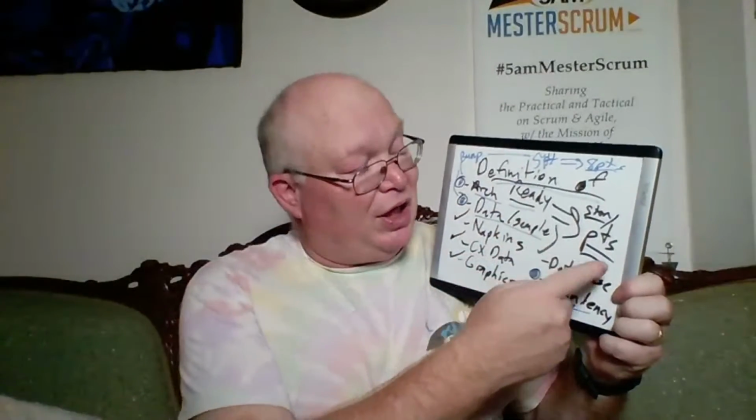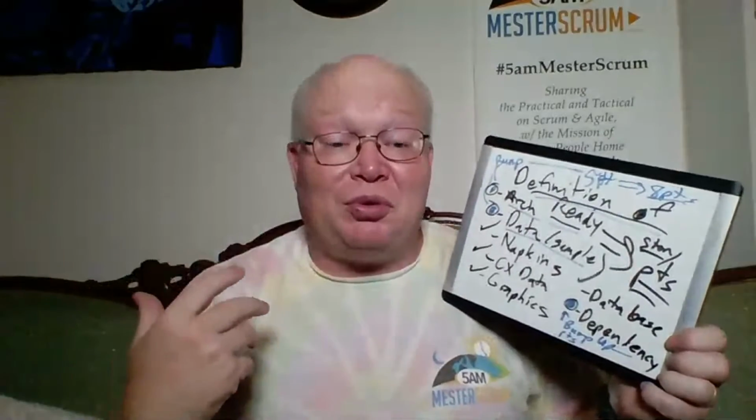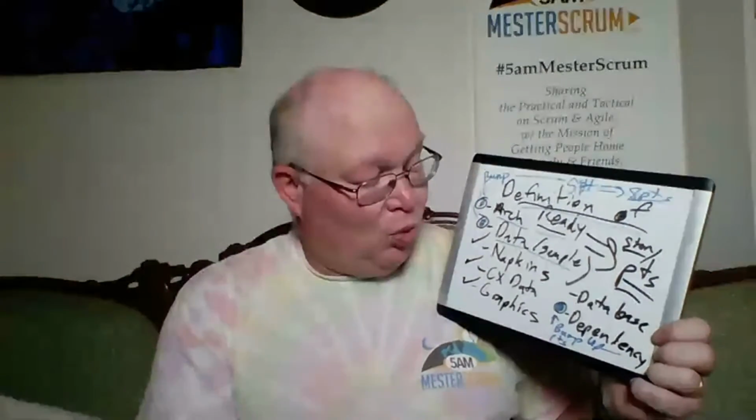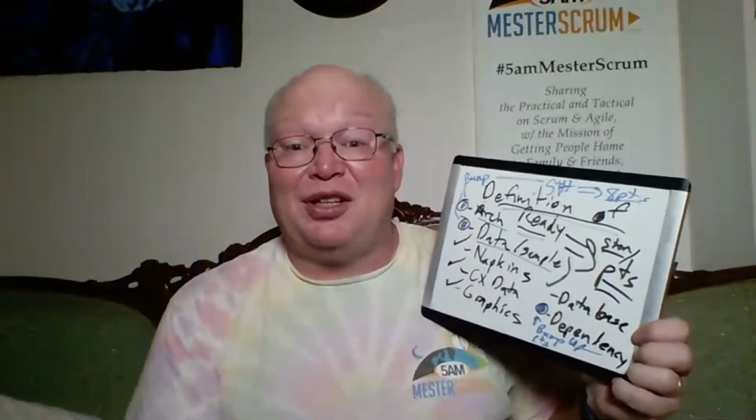So again, just really quick, we're using the definition of ready to help us design the story points, right? We go through, hey, we have all this stuff. We discussed this during the refinement session, all this stuff. Hey, the only data that's missing is dependencies, data sample, maybe an architecture. Because it's not there and we're in the refinement, we're going to bump it up to 8 points because we may have to figure more stuff out, do some more spikes, do some more analysis as part of the stories to develop that. Maybe your BA has to go out and get some more data samples. Maybe the tester does. Somebody has to do some extra work, and therefore we can't get as many stories in a sprint. So this influences what you can get done in a sprint also.